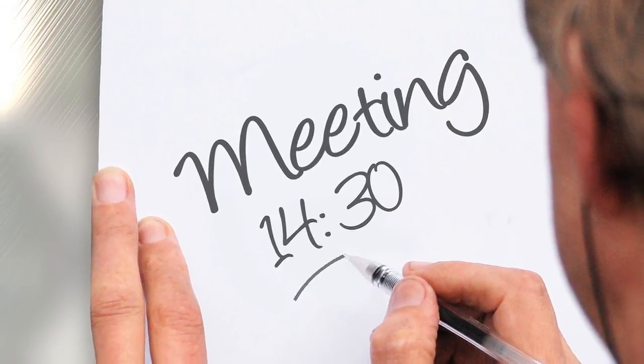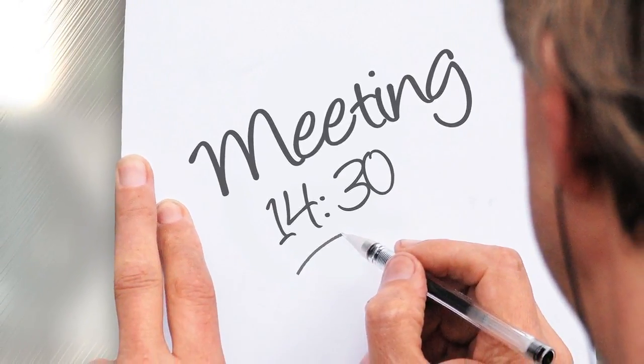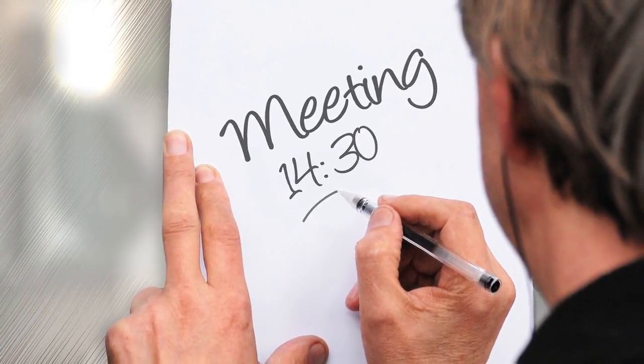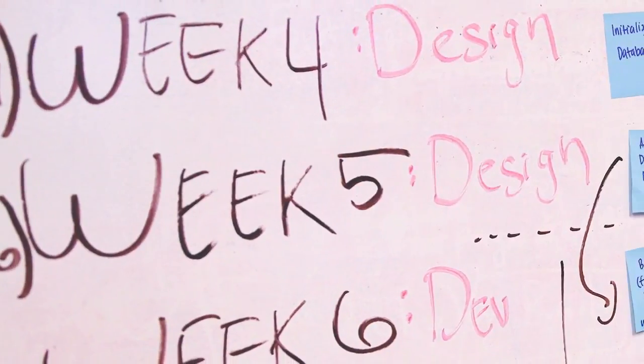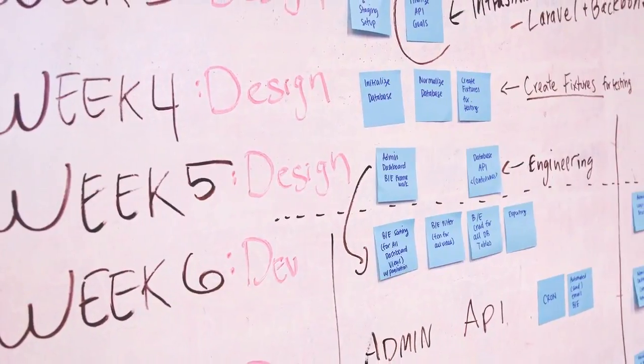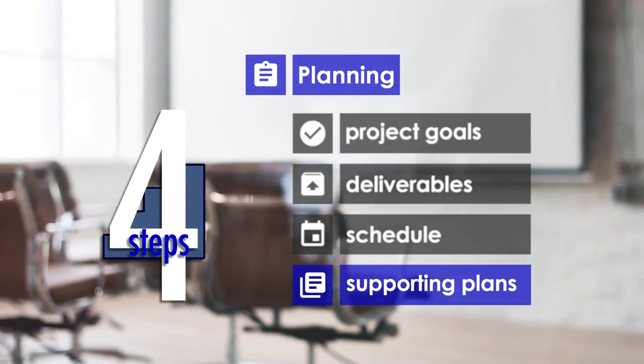Another possibility would be to employ additional resources. However, you should consider the potential impact of doing so. For example, do you have the necessary funds and/or manpower available to do so? Would additional resources be the most efficient and effective way to address the situation? Maybe you should seek to reduce the scope of the project. With fewer products to deliver, less time may be required to deliver them. These are just a few options that may be considered. Whatever avenue you explore, you should use the project schedule and any supporting plans to justify your intended course of action.